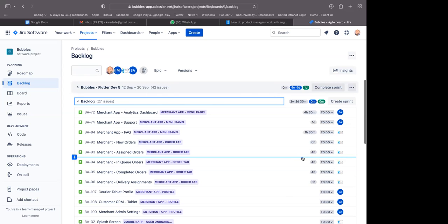Then what you could have is something that you could have, but you can do away with it. But what you must have is non-negotiable. It must be done, right? The should have is things that you should do, but you can make do. What you could have is not as important as what you should. And what you should is not as important as what you must. So that's where the Moscow framework comes from, right?